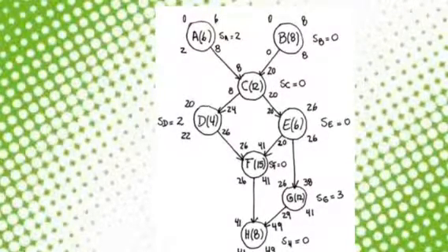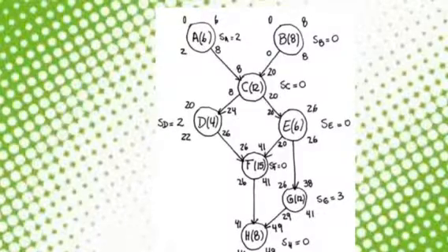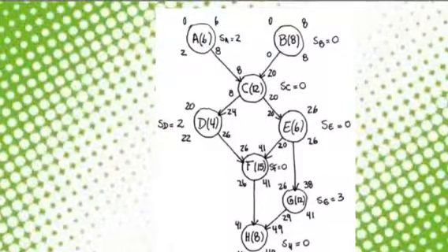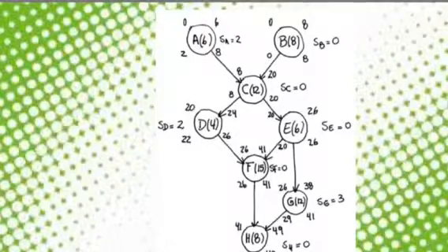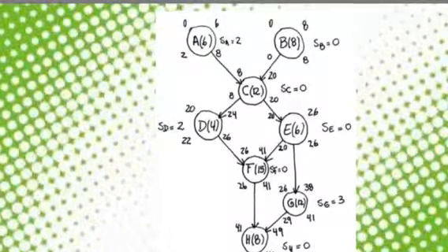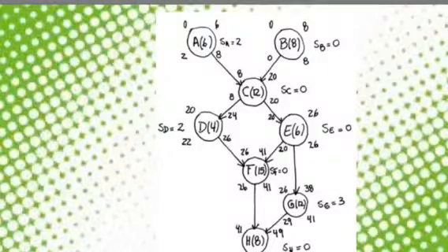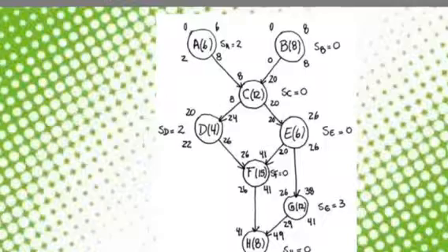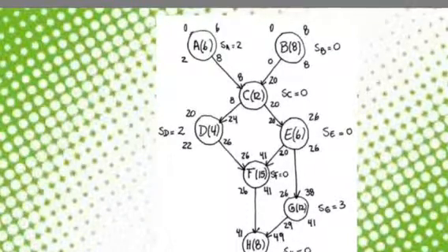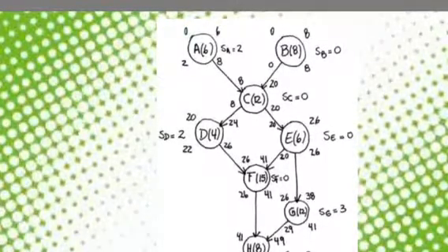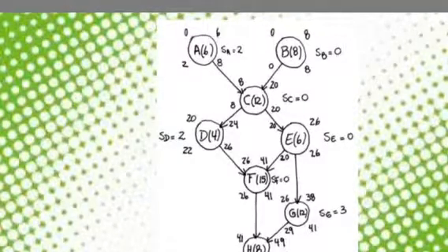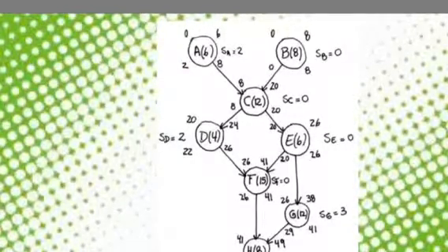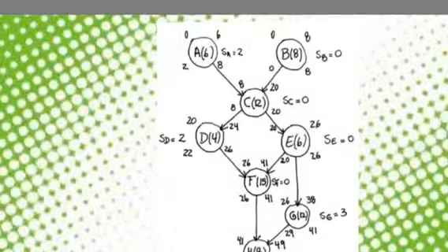To obtain IL and TL of every activity, we move from the end up to the beginning. In this case, the activity that ends last is H, and therefore we ask ourselves what is the latest that H could end without delaying the project TL. This clearly is 49. Therefore, if the latest H can end is 49, the latest H can begin is 41, given a clearance of 8. Then the clearance of H is 0. In the end we have a critical path with a total duration of 49.